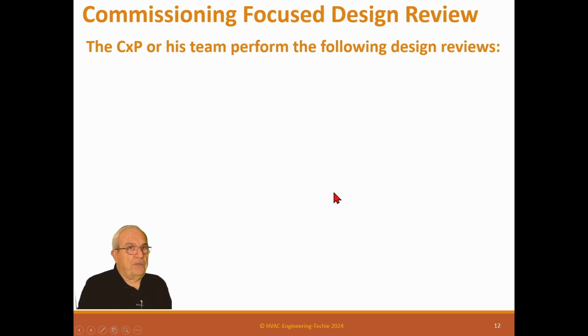Now this is not a peer review, this is a design review, so you're trying to see how well the design is communicated. Can you, as a professional, understand these drawings and know exactly what you're going to build and how you're going to test it? If you can't understand that, the contractors won't be able to understand that.